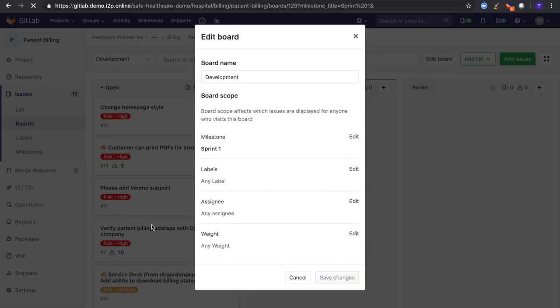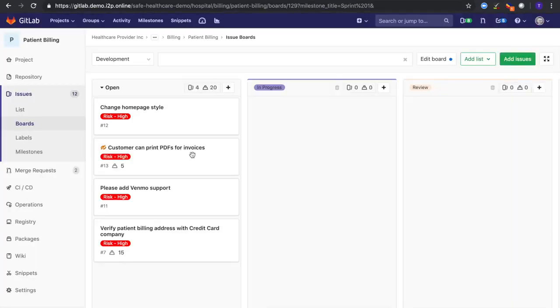specify that I just want to see the issues that are part of sprint 1. And it populates that for me. It shows the 4 issues that I applied to my sprint 1 as part of that sprint planning. And now the team can either, if we're a self-organizing team, or if we're having product owners or scrum masters helping us in assigning which issue we're going to work on, we can have that done here.